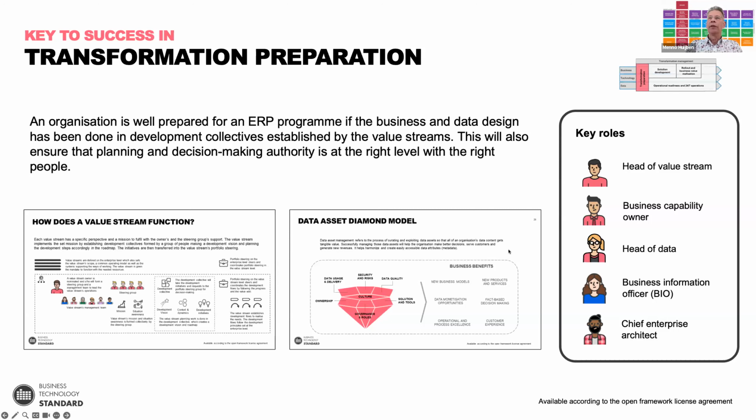We also point out data as very important. Getting data governance in place before you even start an ERP transformation is very important, because it becomes very challenging within the project to start looking for data owners and what have you. So it's very good to have this type of governance models in place before you even start with your ERP transformation.